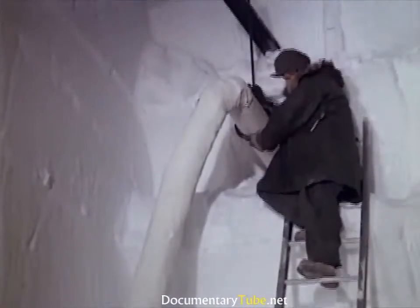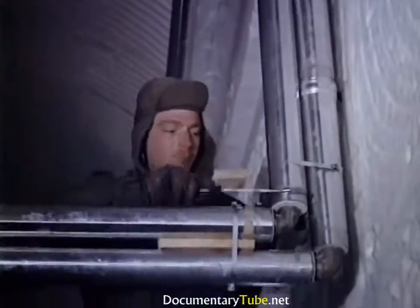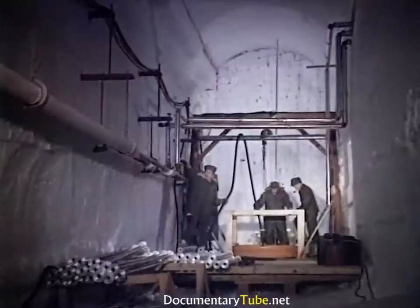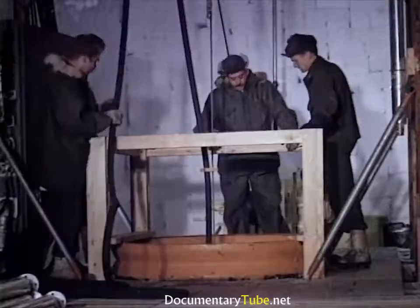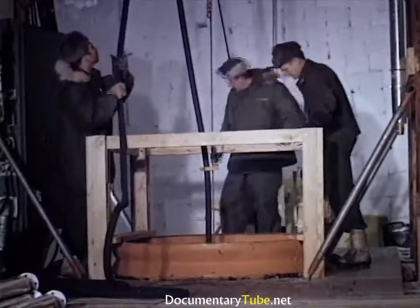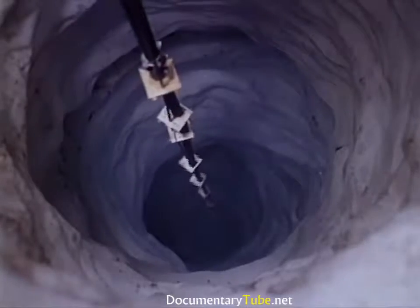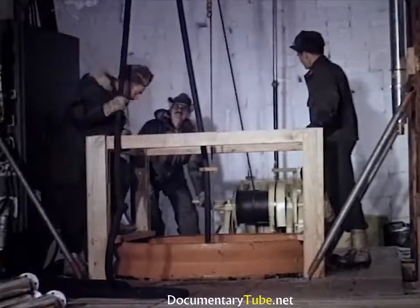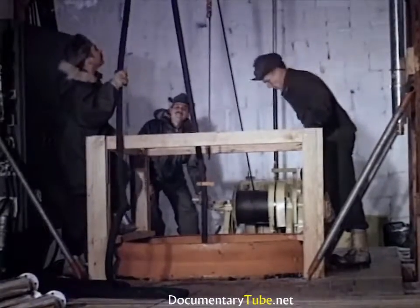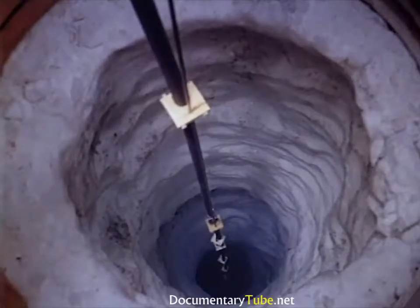For like any modern city, Camp Century required a complex of interconnecting corridors carrying a maze of piping of all sizes and shapes. One of our proudest achievements was our solution of the water problem. A steam hose with a special drilling nozzle was used to melt a hole 3.5 feet in diameter, 120 feet down into the ice cap, until a pool of water formed which did not drain off. This pool provided 10,000 gallons of fresh water daily.